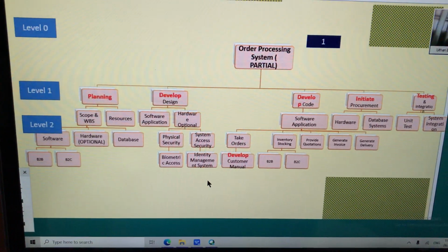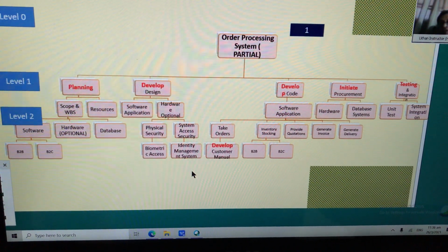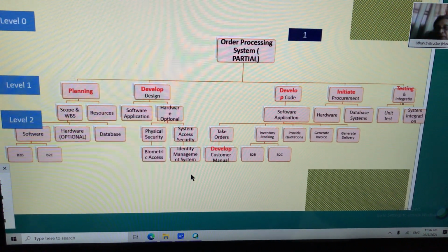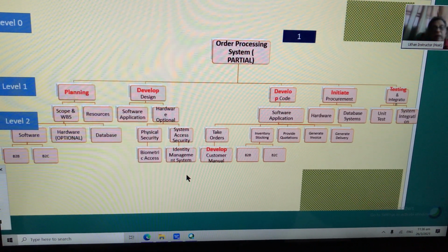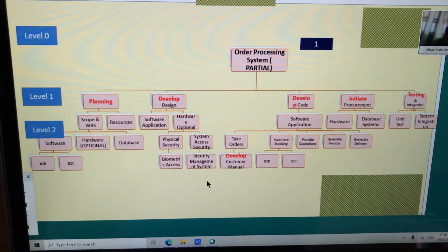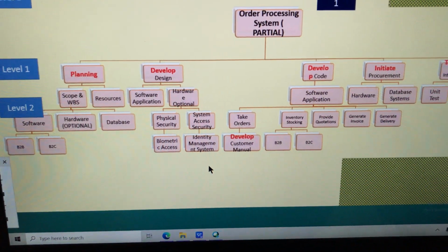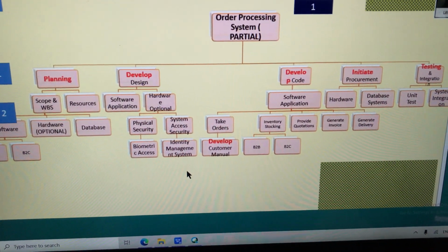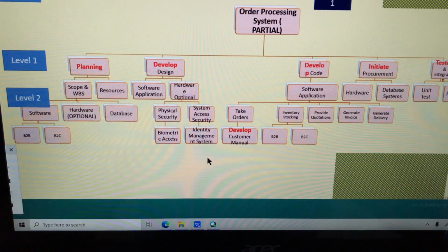If you put it as a work related breakdown, you can easily allocate each of these work items to some individual or teams. But when you put a deliverable oriented one, that deliverable may have a Java component, a Python component, and maybe some hardware component. It becomes very difficult to allocate to the teams, because the teams are profiled by their ability to work. They have some skill set.